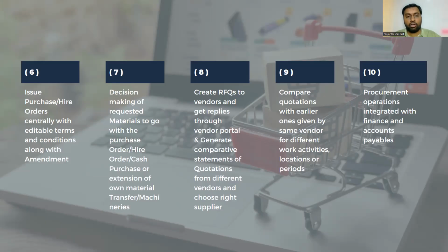So we wanted paints for the metro project. When I was assisting one of my colleagues with procurement of paints, we went upon Berger, Nippon, and Asian Paints. All these three are good quality, Indigo paints as well. So all of these four are good quality. So what we did is we signed a central deal with Asian Paints, but the Asian Paints plant is very near to Mumbai. So the project in Mumbai had a delivery date or lead time of 3 days.